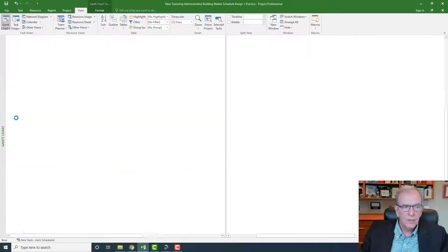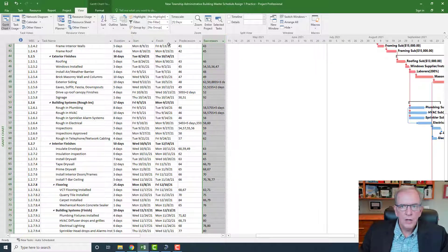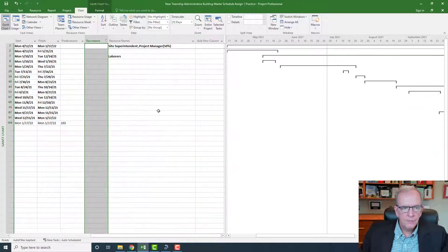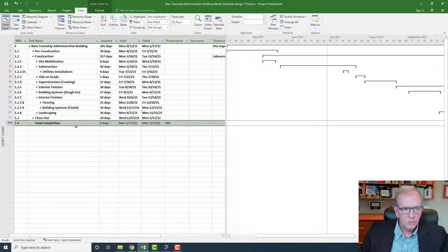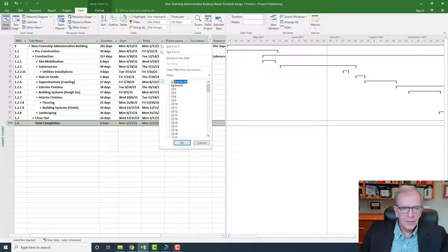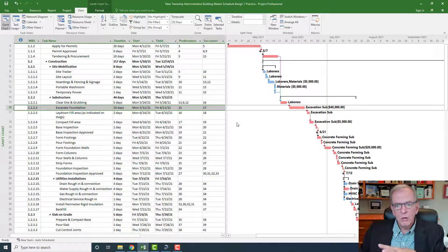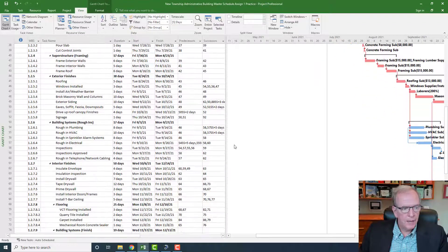Of course, I could also have gone to the Gantt chart and fixed it there. Now if I check my successors using the filter route, I should not see any open ends except for the last activity. Clicking OK — there it is. The last activity, total completion, is the only one without a successor, which is correct. I've made it bold to signify the end of the project. That's the first hack: make sure you don't have any open ends.